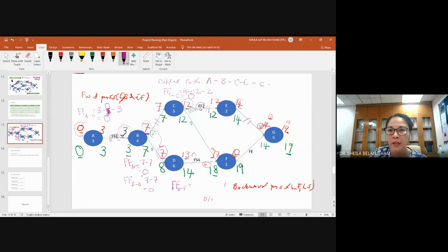As a planner, you place it, for example, you want 4 days lag. But free float occurs when you have a different junction as such, so you have more time. Why? Because you have selected the bigger one here. Remember, when we select the bigger one, the other activity will have additional duration in between. That's why you can get free float in between. So for finish to start, activity D finishes, activity F starts, and you want to see whether there is any time gap in between.